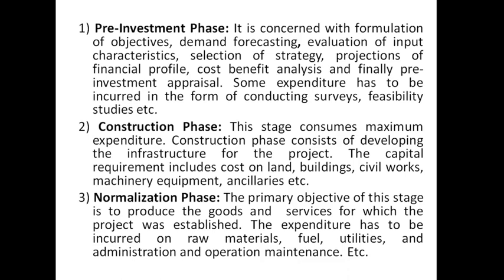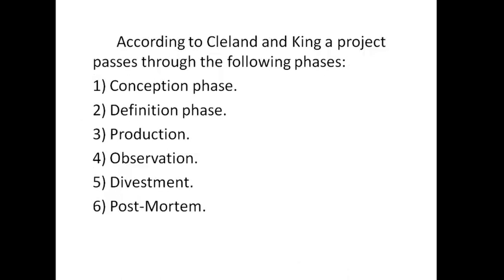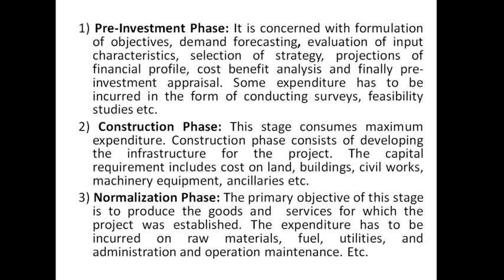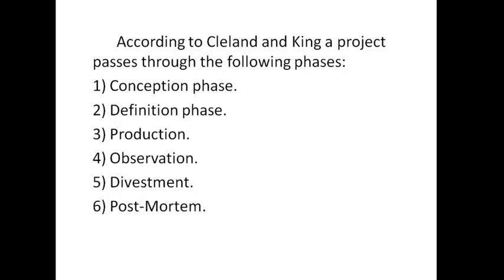In the normalization phase there is operational expenditure. The primary objective of this stage is to produce goods and services for which the project was established, including raw material, fuel, utilities, administration and operation maintenance. The three phases are: pre-investment, construction and normalization. Some sources also describe six phases: conception, definition, production, observation and disinvestment.